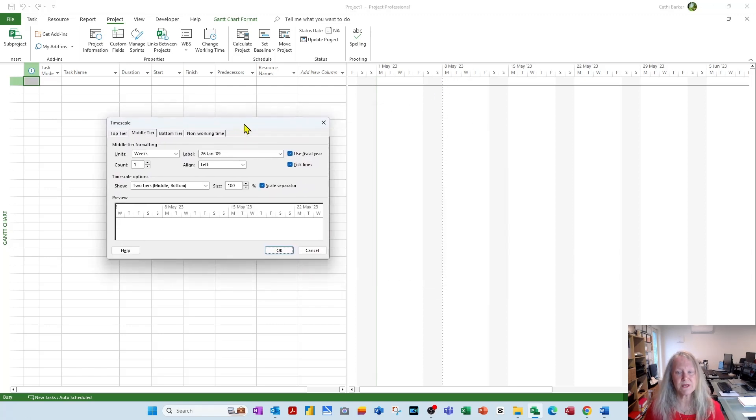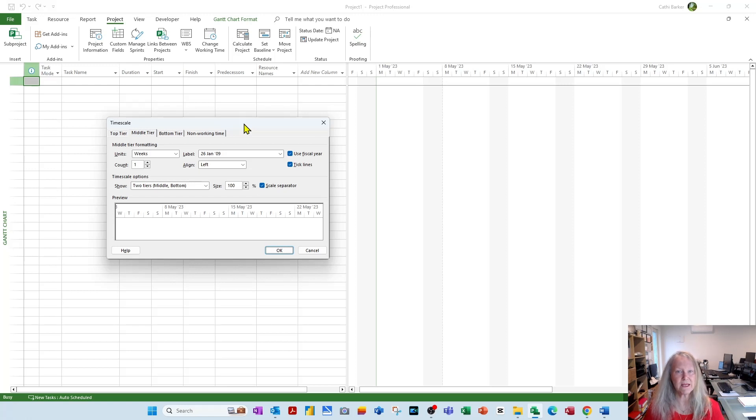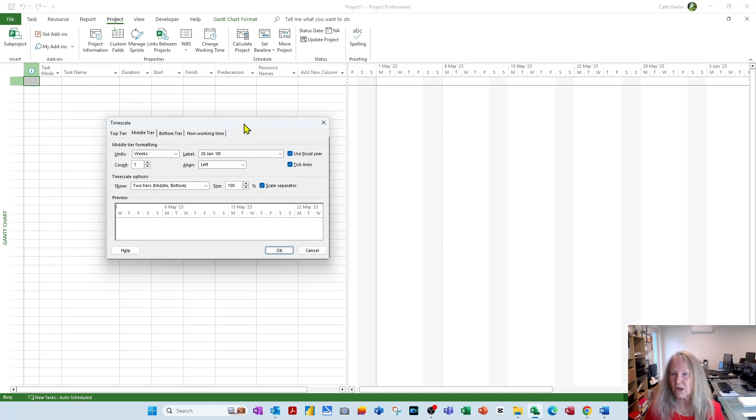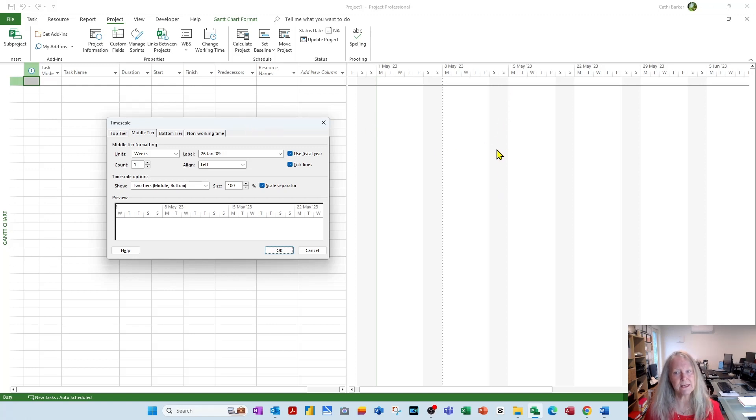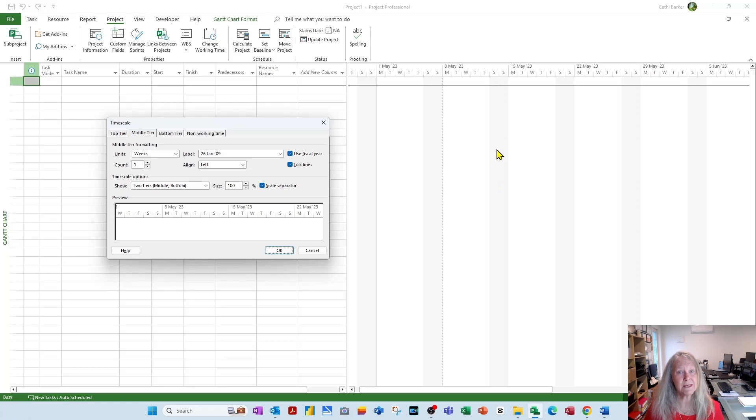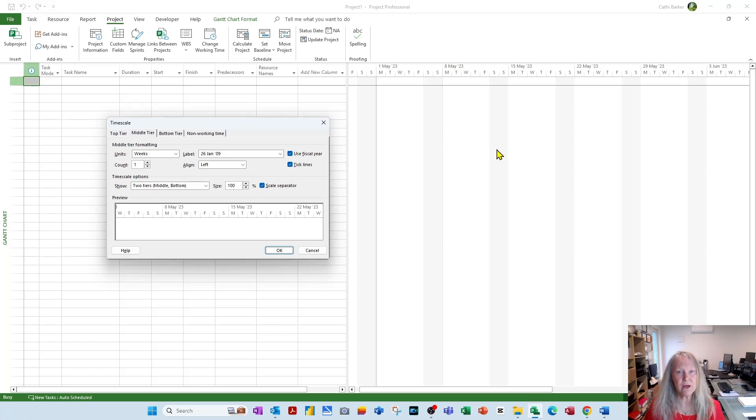Now the thing that bothers me is that if this is a 24-7 shutdown or a 24-7 template, we should not be seeing vertical grey bars here effectively saying that we don't work Saturday and Sunday. Where clearly we've just said we have a 24-hour calendar, and we do work Saturday and Sunday.